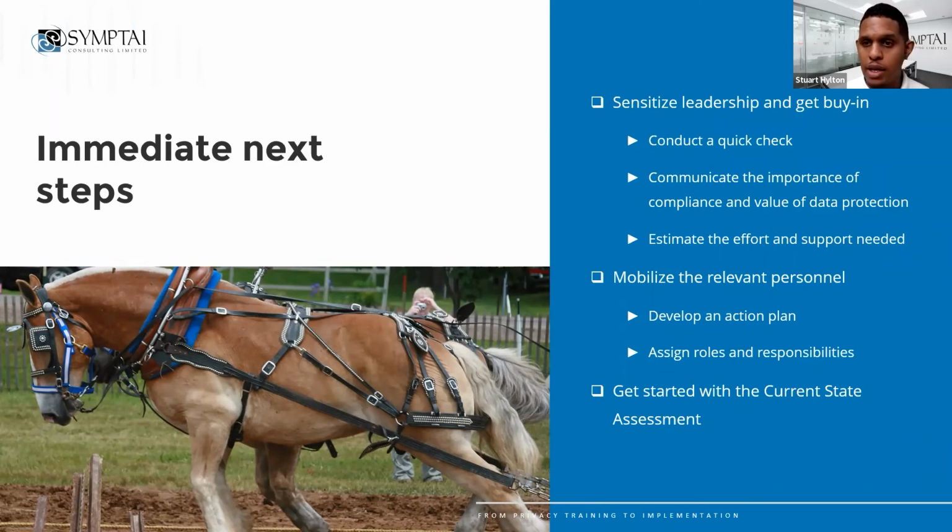Estimate the effort and the support needed. So this is an organization-wide project. This is not just going to be compliance. It's not going to be just IT. It's not just risk management. This is going to be an effort from multiple units or businesses. So for example, when doing your record of processing activity, you may break that up into different parts, send it to the different units and ask them to fill it out, or conduct a workshop with them so that they understand how to complete it. And then your job as a lead may be to put it all together and double check it to make sure this makes sense and it has captured everything that we need to.